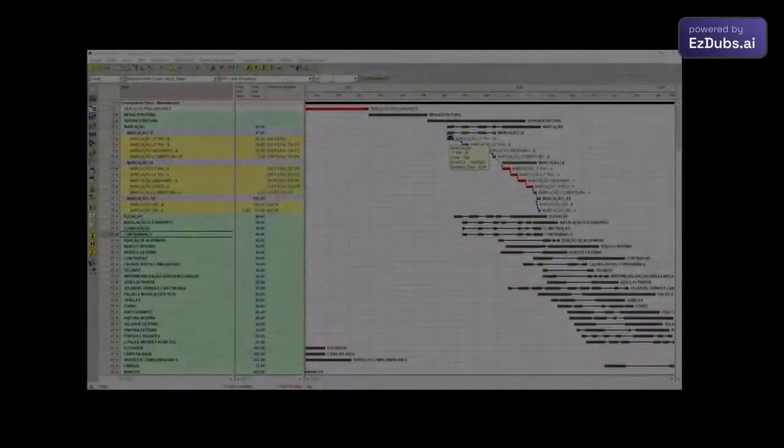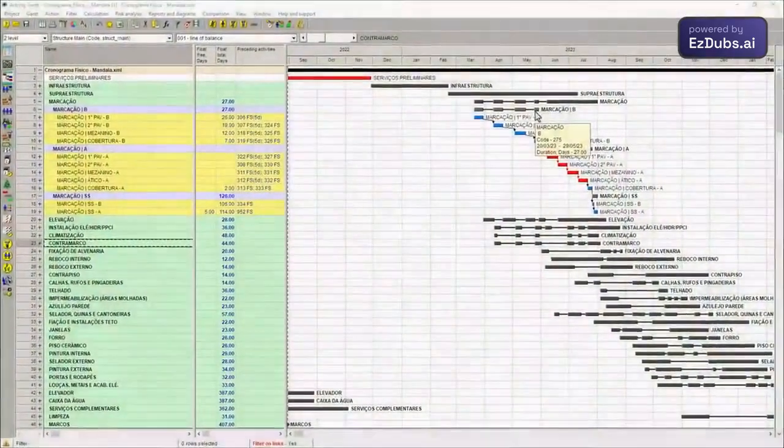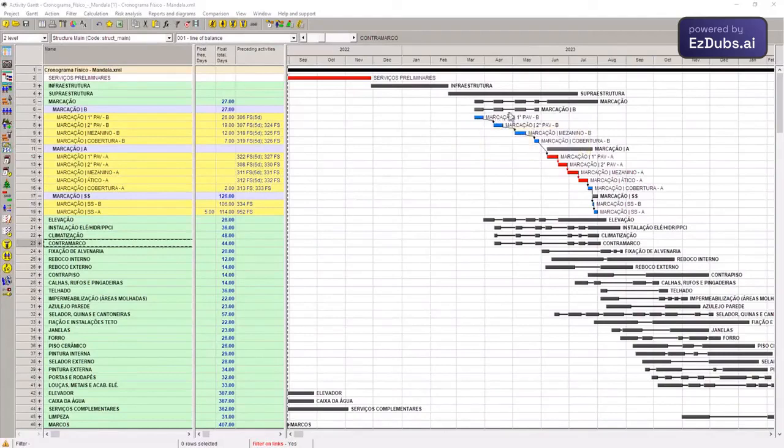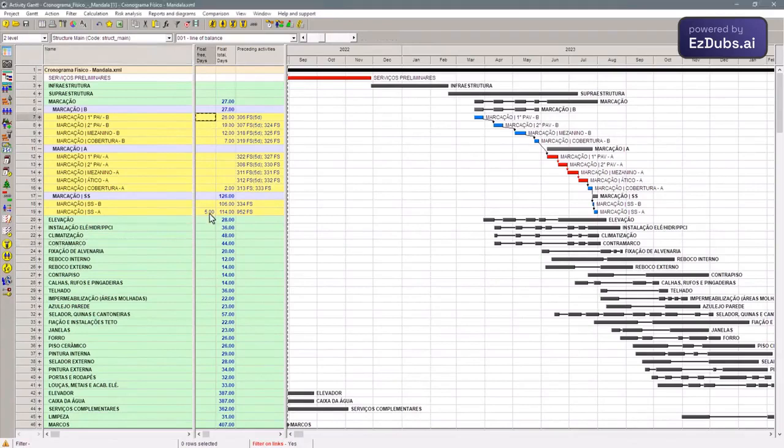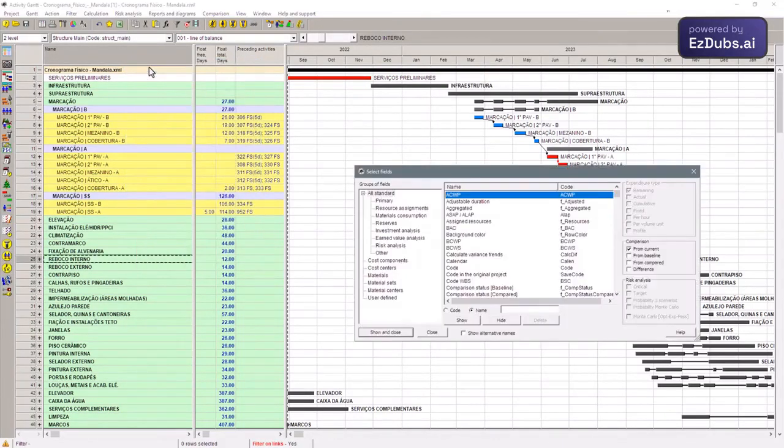We are in the other tool, and the other tool I already mentioned shows here the product representation bar, strangled at some points, which are precisely the points where there is no work produced. There is existence, but there is no work. Following the same line, I have 0 free float here, but I have total float here. So who precedes me? It's the 306. Who is 306? Code 306. I'll try to locate it here.